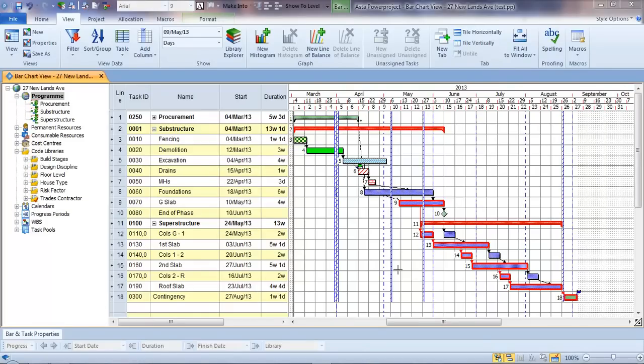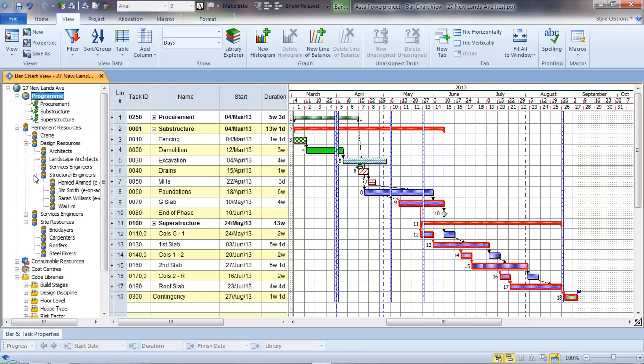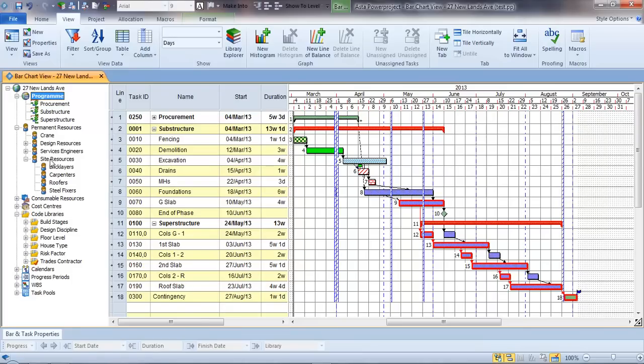So once we have the activities, then activities can also have resources and costs assigned to them. And resources are different to the colour codes which were shown, which are just responsibility codes. So in the resource library, we can have different resources, and these can be hierarchically arranged. So you can have parents and children in this library. It greatly simplifies the list, and the folder level is also quite an important concept about skills.